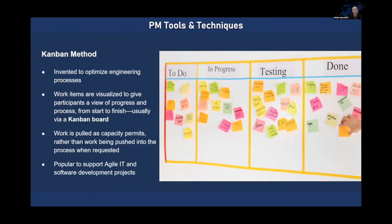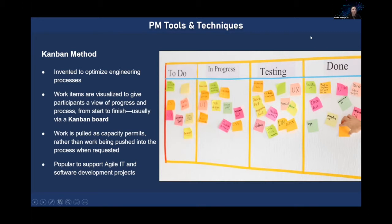One good tool for agile is called the Kanban method. It was invented to optimize engineering processes. It's a visual technique where your work items are presented as sticky notes, cards, or written on a whiteboard in the room where everyone is working, giving everyone on the team a visual representation of progress from start to finish throughout your project — that's called the Kanban board. There are web tools you can use for this, such as Trello and Microsoft Planner. You can do it physically on a wall or virtually through a tool on the web.